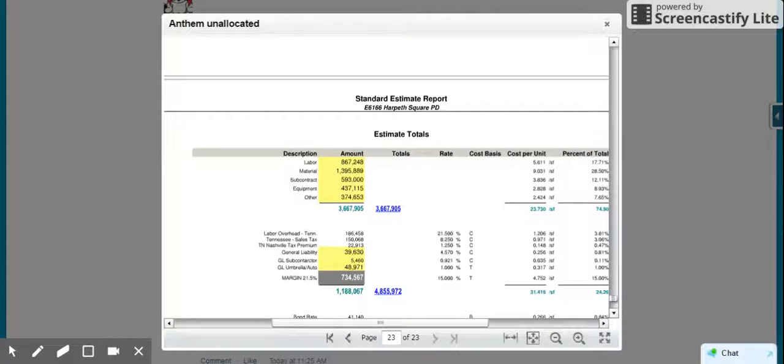Here to get all the information that I need for the potential change order. So basically it's transposition. A couple things to note on the Timberline estimate. Your overhead, as you can see, is pretty much overhead, so that'll go into your overhead bucket. Your sales tax will go into T&B, and the other components will go to T&B as well. So just make sure that you map those correctly. It helps you downstream on your budget maintenance. So let me go ahead and just fast forward after keying all this stuff in, and I'll see what a completed one looks like in just a second.